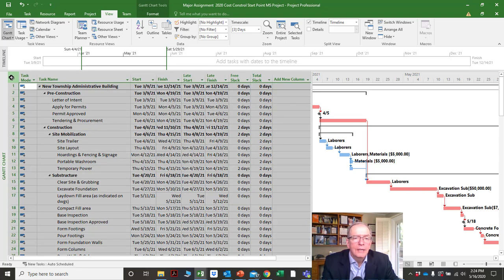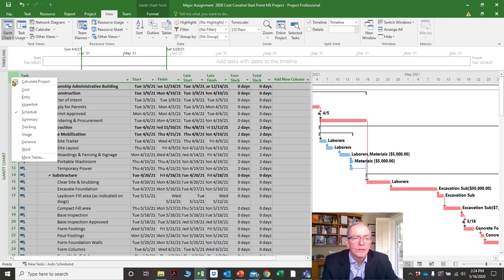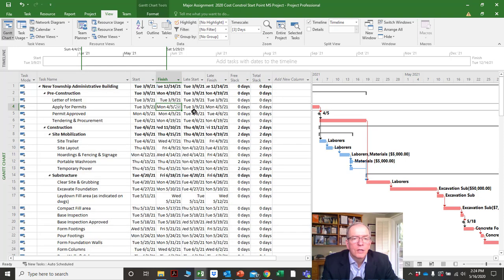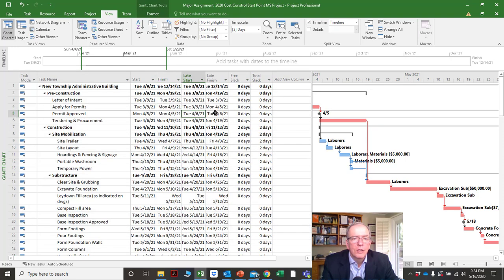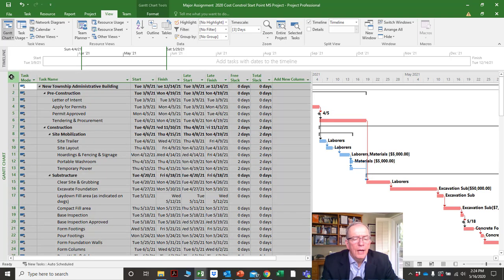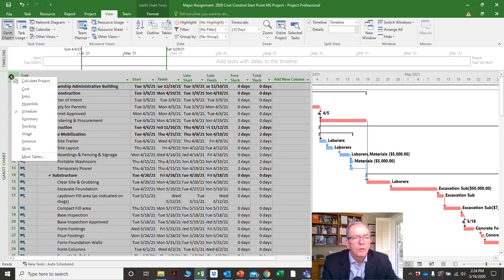So the schedule screen is really like the critical path screen in that it shows you where the float is and what your early start, early finish, late start, and late finish dates are.